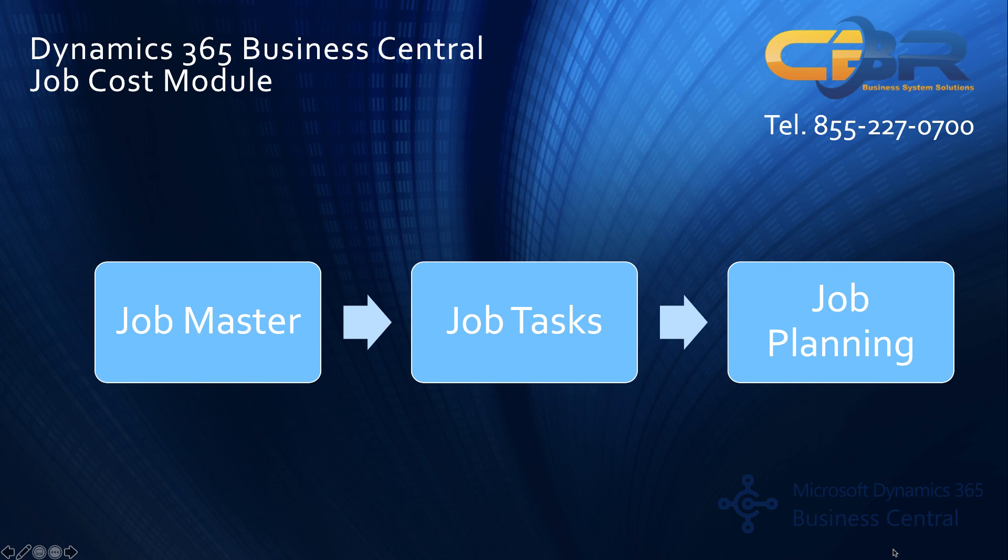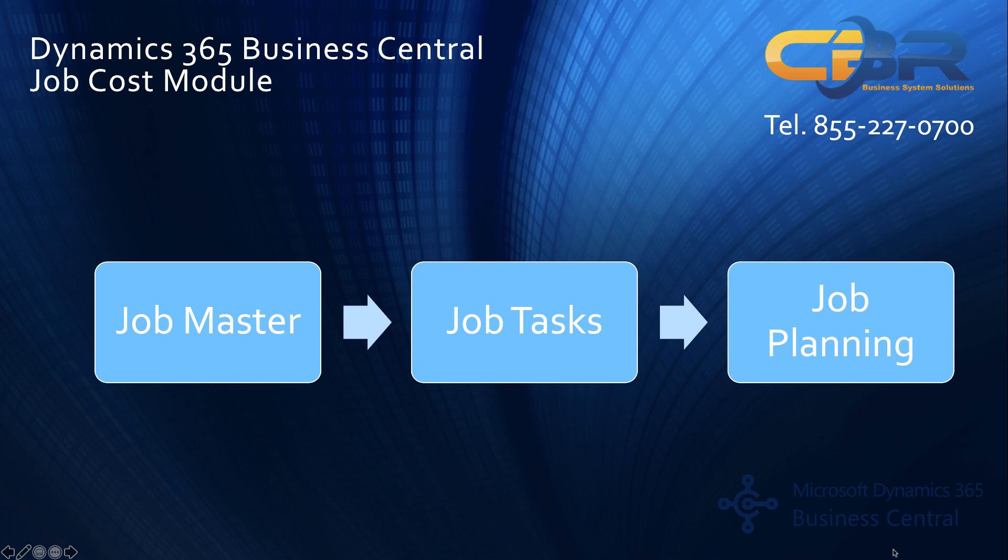Once you have job tasks configured you can also add the ability to do job planning entries. These job planning entries can be budgetary or they could be billable with regards to the actual lines. Important about job planning process is that job costing includes typically the management of resources and time of human resources typically. Of course that could also include equipment and machinery but you could also configure budgetary lines on an inventory basis and on a GL basis.